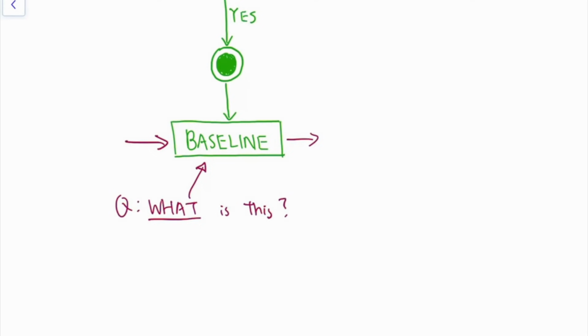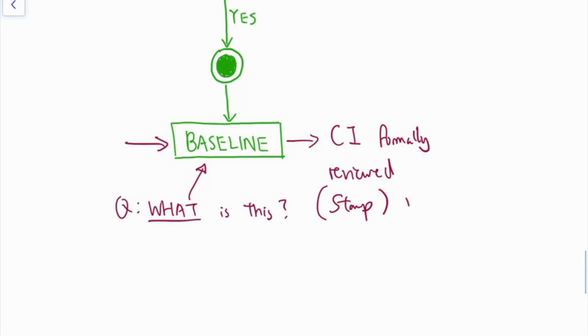It can be treated as a stamp of approval and say that this is now version 2, and anything that we want to fall back on, we'll fall back on version 2 first, which is supposedly the most recent approved version. So that is called the baseline, and we are increasing the baseline once the change request is considered done.